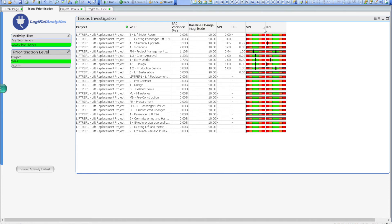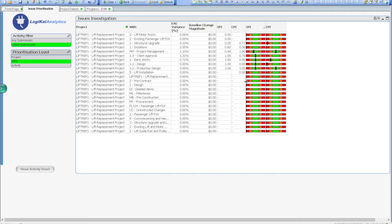We'll make sure that the WBS element is being sorted by schedule performance index, and very quickly we can see that there are four elements that are outside of our expected performance levels. The remaining elements, with no performance at the bottom of the graph, are the WBS elements that are not scheduled to start yet, so these are not prioritized.